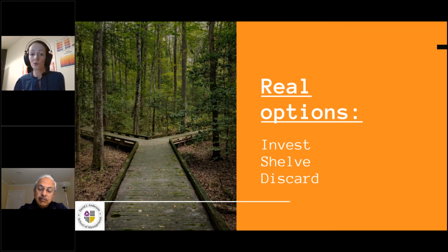And this is what you should do at each step of your discovery process. So say you have a process which consists of a pool of ideas, then some risk analysis, procedure reading, and design. Yeah? At each of these steps, you reach a point, which I will cover in a moment. This is a point of diminishing returns. And at this point, you need to decide whether you want to invest, discard, or shelve.